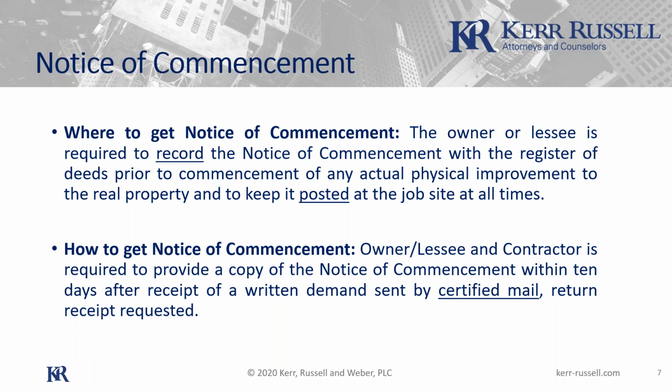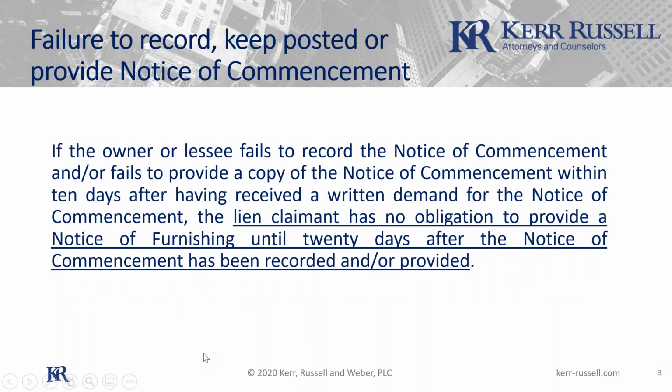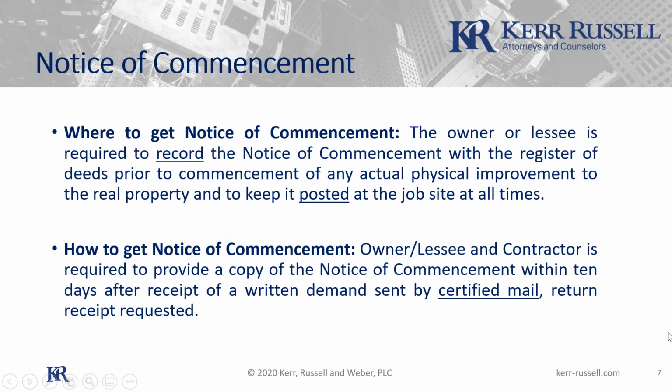So with regard to the Notice of Commencement, the owner is supposed to record it at the Register of Deeds in the county where the improvement's being done, and he's supposed to keep it posted at the site. And then this next bullet point's the important one for you guys. If you want a copy of the Notice of Commencement, you need to send a request by certified mail. So in a perfect world, the accounting staff at your company would know to send out that request via certified mail for the Notice of Commencement right at the beginning of the project.